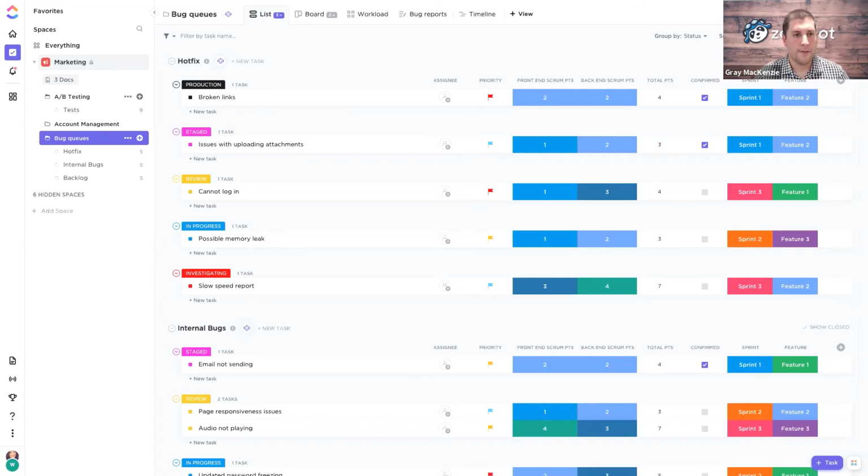But most agencies that we're working with, I will say this is accelerated a lot. One of the luxuries that we have is the ability to plug in a lot of pre-built template stuff for agencies that we didn't have when we first started doing this. So that's allowed us to take what often would take 4 to 6 or even 8 weeks and condense that down often into 2 to 3 weeks, to get the structure that we walked through today in place. You can get that high level framework for sure in place for most agencies, certainly within 30 to 60 days.